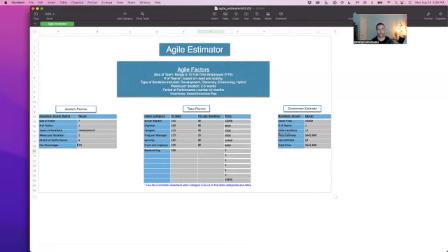And this is our total program. So again, the period of performance could be adjusted, but all of this calculated over here. We now have our cost for our total iterations, which is 12, and our team price. So this is what it costs per iteration and our total price. Our independent government cost estimate is $645,600, but maybe we made a mistake and we actually want to duplicate it. We want 2, and it just doubles the price. Maybe it's actually 12 months, and again, it just doubles the price from there.